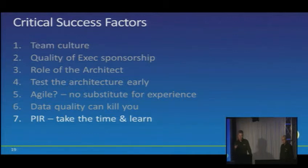And the interesting thing was that most of the things they came up with actually came back to the classic causes of project management failure, which the Standish Group highlight in their reports. And in fact, some of them are in here. In fact, the number one that they talk about is lack of quality executive sponsorship. So those are not all the factors, but I think they are really particularly important in the world of BI. So I'll stop my little preaching and we'll talk about some more interesting stuff and talk about the future.